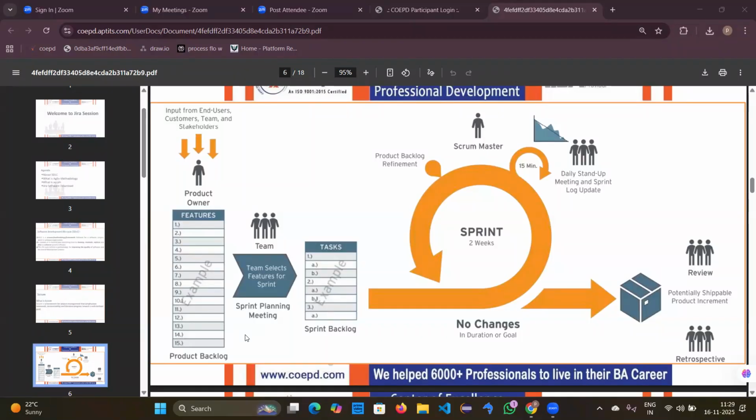For example, with the same login process, the acceptance criteria would be that there should be fields or boxes so that the username and password can be entered. That can be one rule. Also validation: once your username and password are entered, the validation should be processed in order to go to the dashboard. That can be another rule. Like this, rules will be maintained in the acceptance criteria.